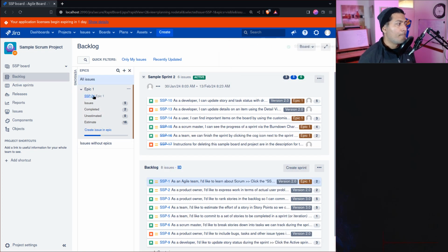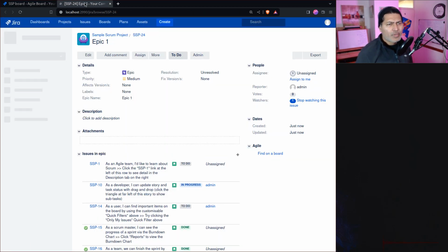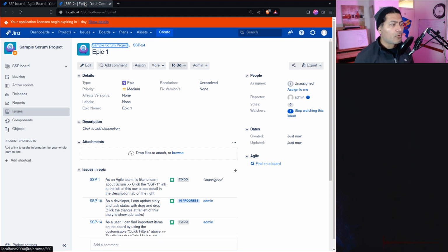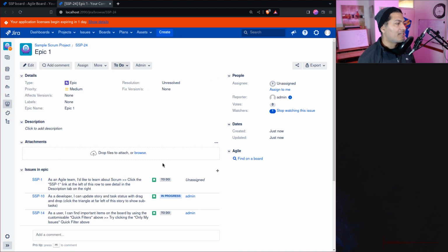Epics are something that you may complete in maybe 1 or 2 sprints. Ideally, if you are trying to follow agile by the book, a story is something that you should ideally aim to deliver in one sprint, right? Okay, so let us not talk too much about agile. I just want to talk about this automation.